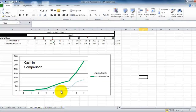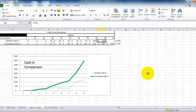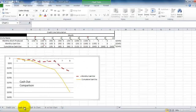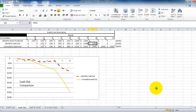Now let's look at the cash in comparison. This light blue line is your monthly cash in reflected in this row. For each month, our highest cash in is going to be $130,000, and notice it's in month nine — relative to our highest cash out of $130,000 in month eight. So there's a lag of a month of when you're going to need those funds.